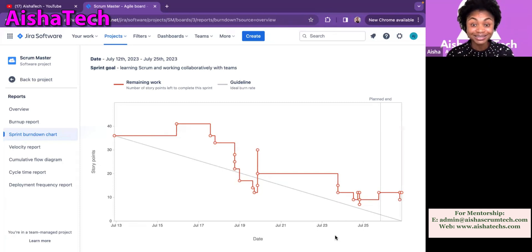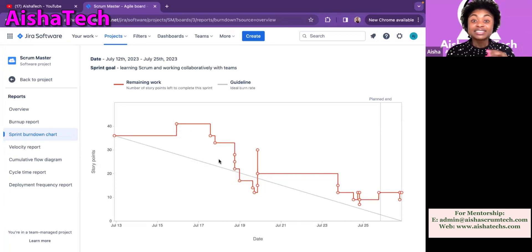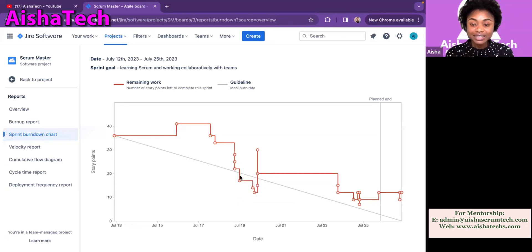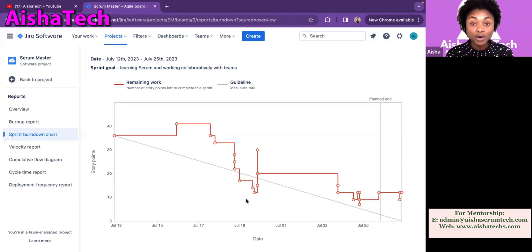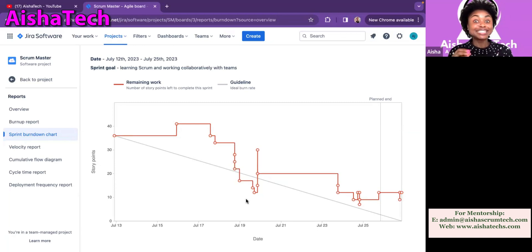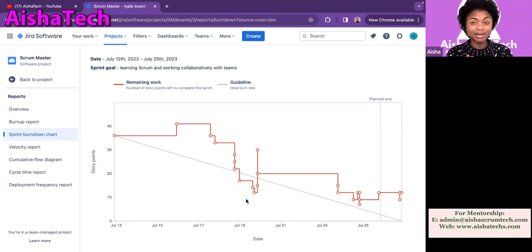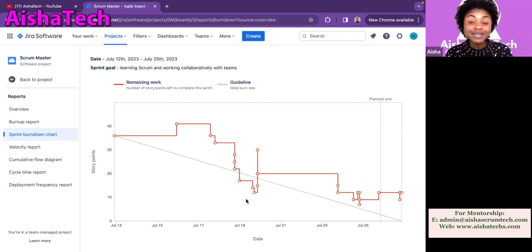Two days after the sprint started, I noticed a scope change — the line went up, meaning the team added work to the sprint. Then the line was flat again — they didn't do anything. Next, the team started closing their tags, as I can see from the two different dots here. They started doing so well that they came within the guided line, and continued at such a good pace — even within the Jira prediction of completing their work on time. This is an excellent trait: I've seen teams wait until almost the end of the sprint before closing tags, but this team proactively worked throughout the sprint.